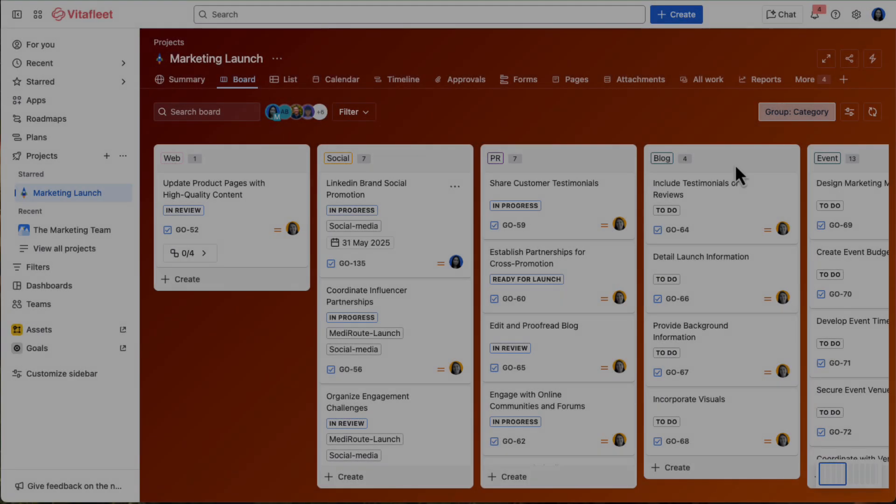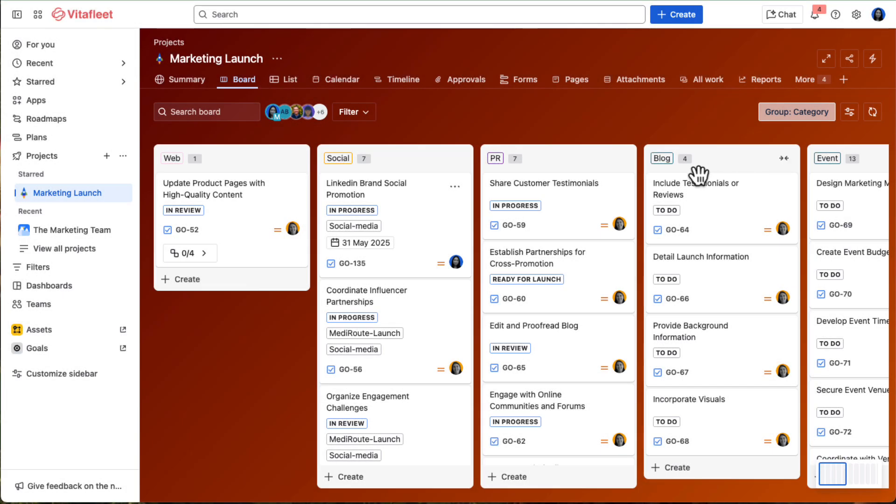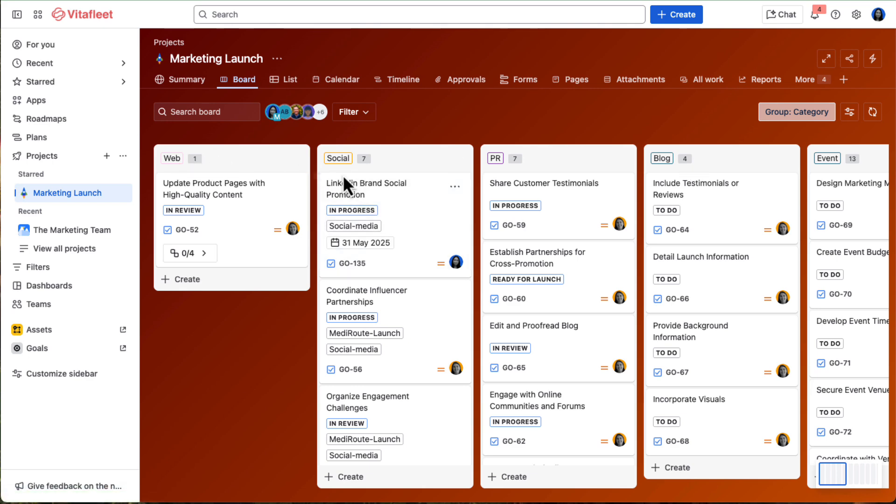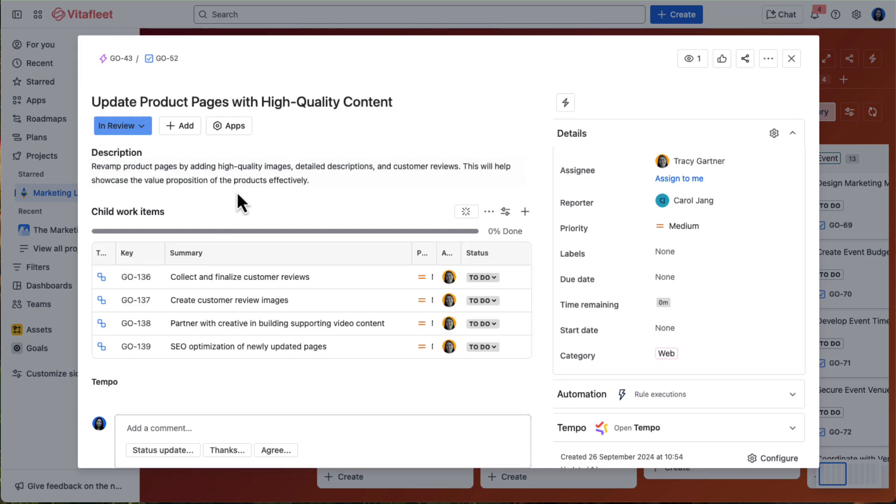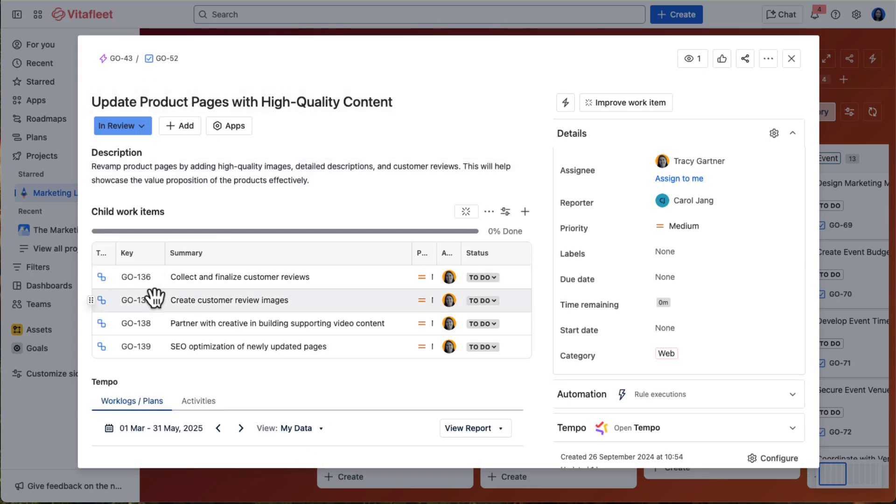In JIRA, Tracy organizes the work outlined in her original GTM strategy doc by channels like website, social, PR, blog, and event, with categories. She then creates work items with nested subtasks to break each piece of deliverable or campaign down into manageable pieces.